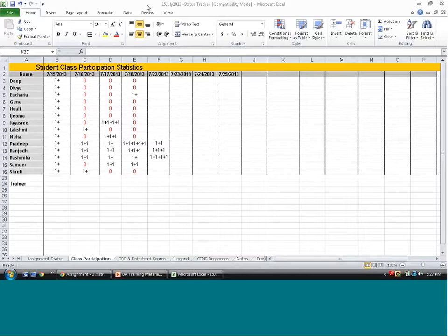Now, if it's a certified organization, I'll have to talk to the project manager, and they report to me about the conflict, and the project manager will then decide what requirement is going to be used on the project. And now, if it's a matrix, that's where I have to maybe call a meeting between the two managers, the functional manager and the project manager, and as a team, we can decide what the requirement is used for the project.